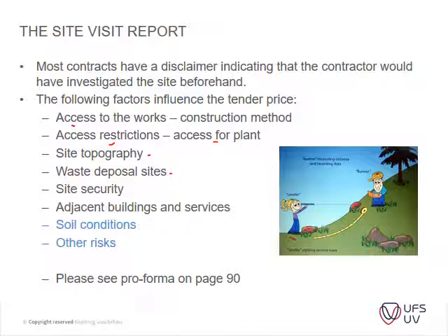Waste disposal: is there a dump site nearby that you can actually take your plant or your dump material to? Are there supplies for your material nearby? And then you've got your site security. Do you have to spend a lot of money on your site security? Is it maybe located within the Joburg CBD?